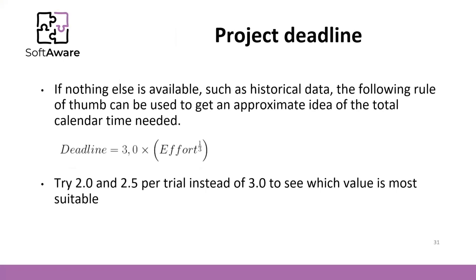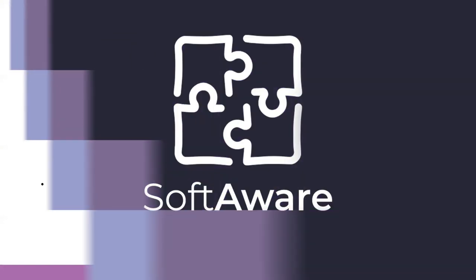If you don't have anything else to calculate the project timeline, you can use a rule of thumb formula — trying values of 2.5 or 2 instead of 3 to see which is most suitable. It will help you after making a thorough analysis of effort and duration as a reality check. We have more to say about time planning, and in the next video we will talk about issues that complement this time estimation of effort and duration. See you in the next video. Bye-bye.